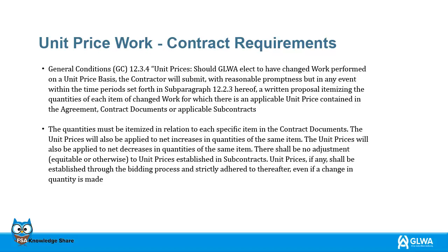There shall be no adjustment, equitable or otherwise, to unit prices established in subcontracts. Unit prices, if any, shall be established through the bidding process and strictly adhered to thereafter, even if a change in quantity is made.